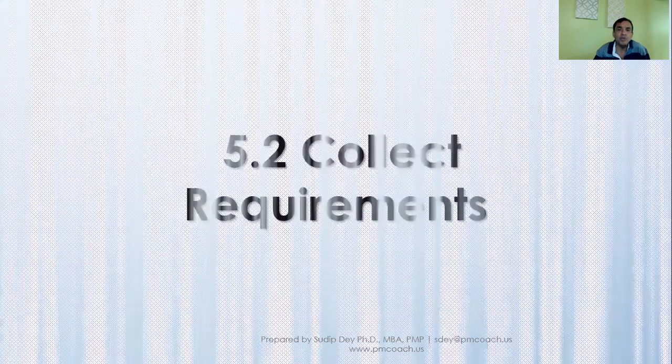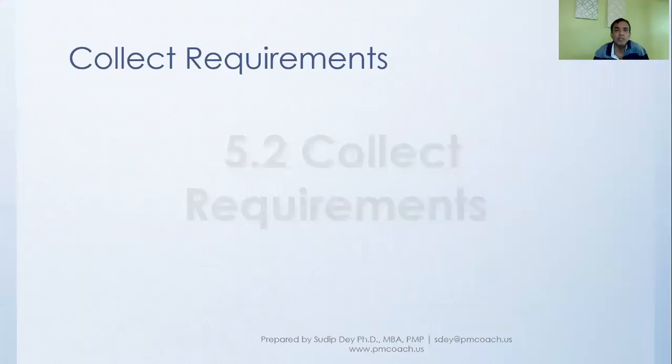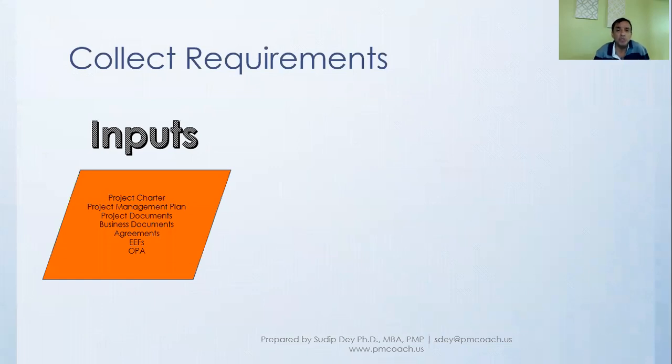So that was the plan scope management. Now let's look at the next process, which is collect requirements. In collect requirements, the inputs are project charter, project management plan, project documents, and business documents.